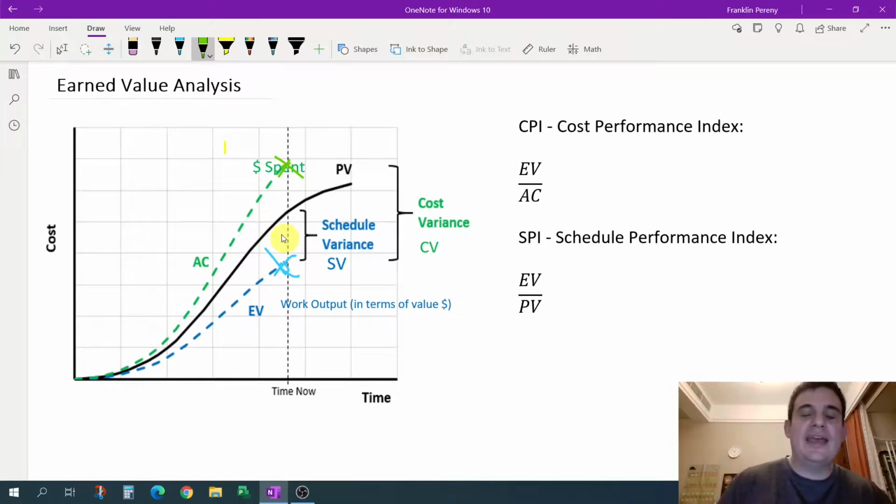Your original plan was $1,000 per mile, but if your cost is double and your output is half, that would be 4 times difference, because your cost is double times 2, but you've only gotten half the work done. So that would be 2 divided by 0.5, right? That would be a 4 times delta.